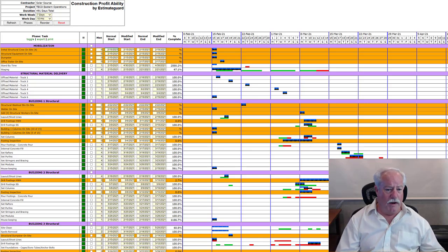And if we have to remove that contractor, we'll do that, but that's messy work, and I didn't want to take them there, okay? Because that involves lawsuits after the project's done and things that linger on and on. My other solution was, you convince your subcontractor that I'm going to take over their crew and basically their portion of the work. We're going to use them, but